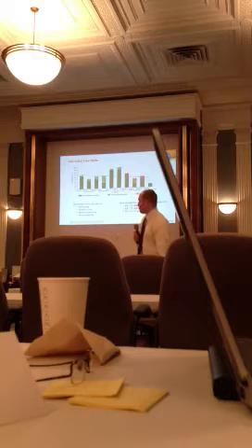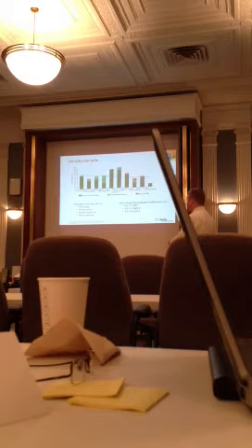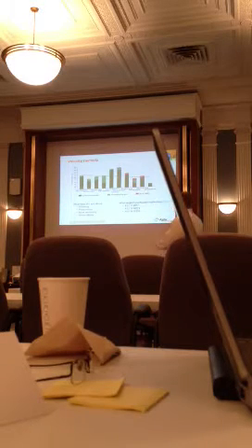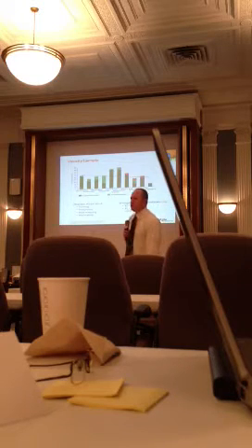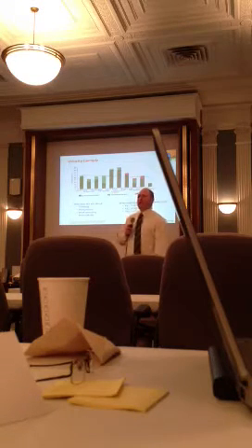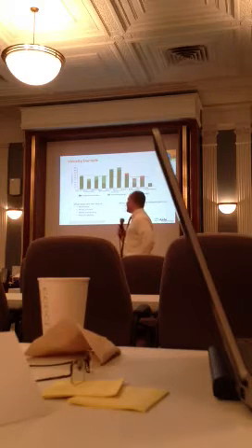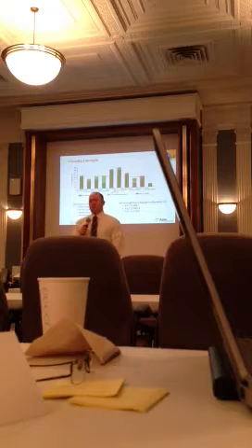So now these 20 story points carry over into the next iteration. But then he gets back in the office, and I can look at this and go, okay, well, we had 20 story points carry over. Now I get my top person back, and I have a full staff. And I let my team commit to 100 story points.